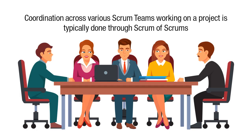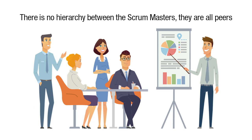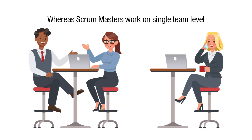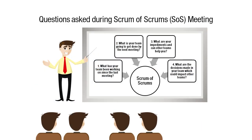Coordination across various Scrum teams working on a project is typically done through the Scrum of Scrums. There is no hierarchy between the Scrum masters; they are all peers. The Chief Scrum Master just works on a multi-team level, whereas the Scrum masters work on a single-team level. The following figure provides questions that are asked during a Scrum of Scrums, or SOS, meeting: 1. What has your team been working on since the last meeting? 2. What is your team going to get done by the next meeting? 3. What are your impediments and can other teams help you? 4. What are the decisions made in your team which could impact other teams?